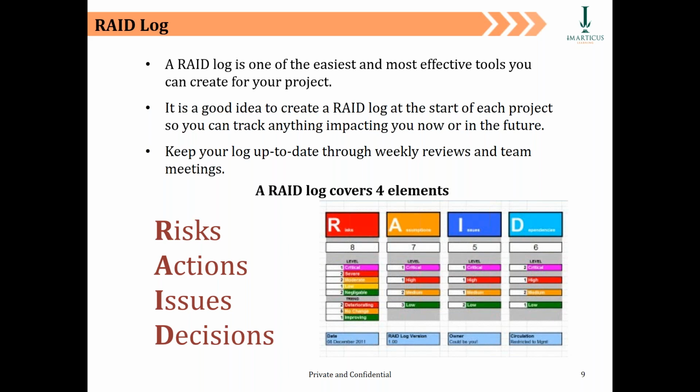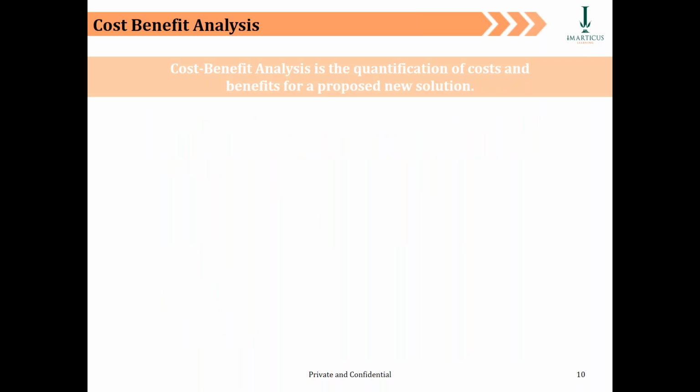My thought is, as a BA, keep a RAID log in your hand all the time, keep updating it while you talk to different stakeholders, so that you know as a business analyst what the risks involved in the project are, and how we are trying to bring them down. And then what are the typical issues which are being decided upon to knock them out. The RAID log helps you to log day-to-day issues, day-to-day actions, day-to-day resolutions, and hence it translates into weekly and fortnightly updates for your team.